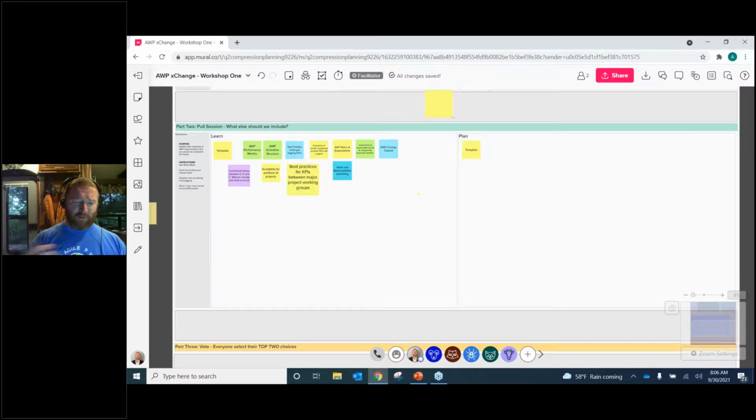And we looked at the cost of things like training those people. Then you're getting into technology. If you're going to execute a $1 billion project, you're not going to do it with a piece of paper and a pencil. So what does the technology cost look like? And we scale the technology cost relative to the TIC of the project. And all of these are factored against the durations.